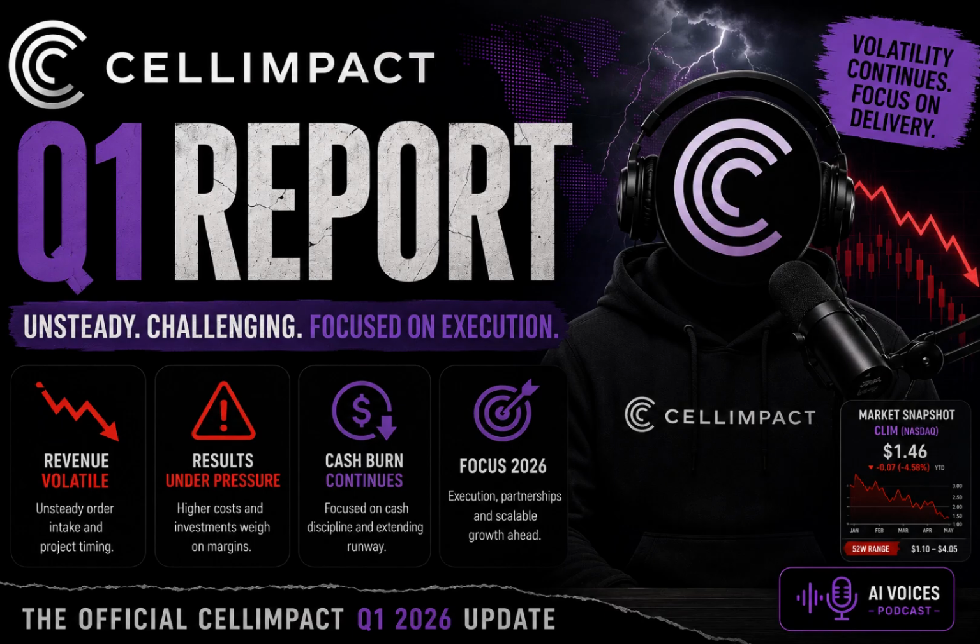Oh, this part was fascinating to read, because it shows exactly how you untangle a paralyzed supply chain. Right. Originally, they had an 18 million SEK agreement, structured normally. Cellimpact makes the flow plates, delivers them, gets paid. But as we discussed, the European market is stalled. Because of severe project delays on the customer's end, Cellimpact delivered 0 flow plates in 2025. 0. So that entire 18 million SEK project just vanished into the indefinite future. And future revenue doesn't pay today's bills.